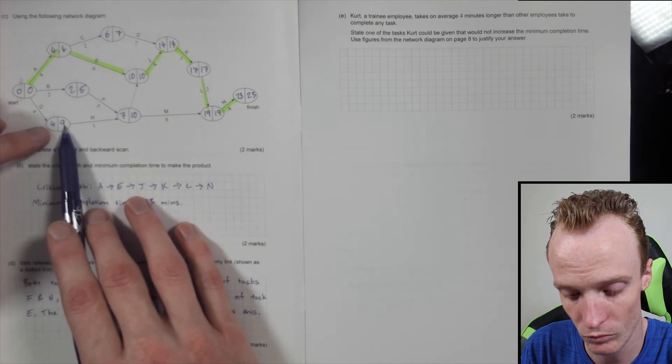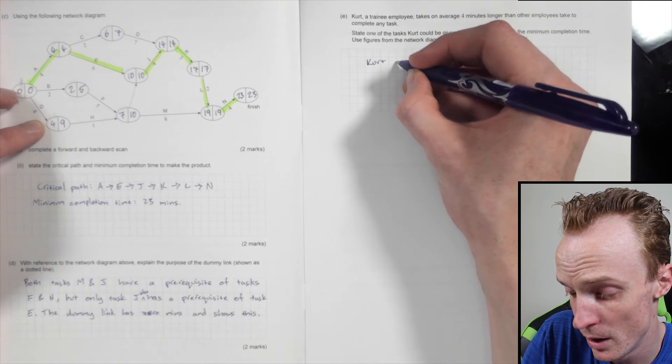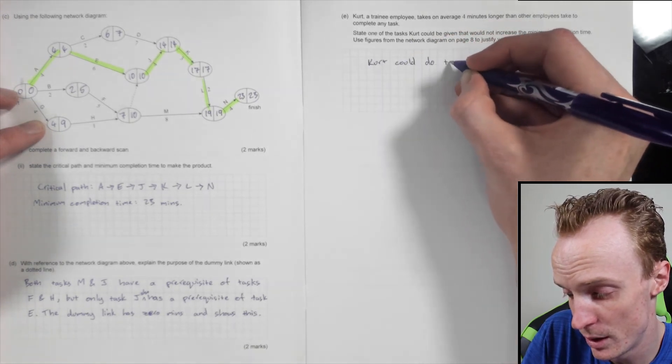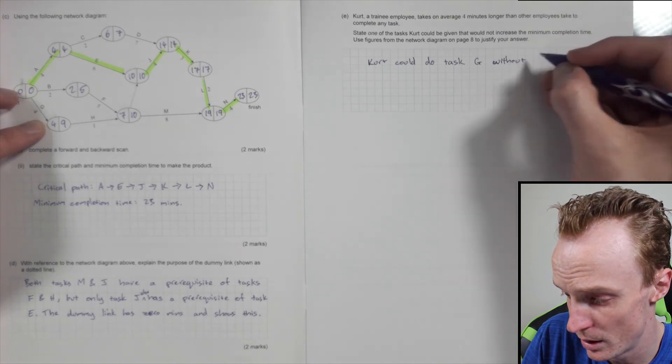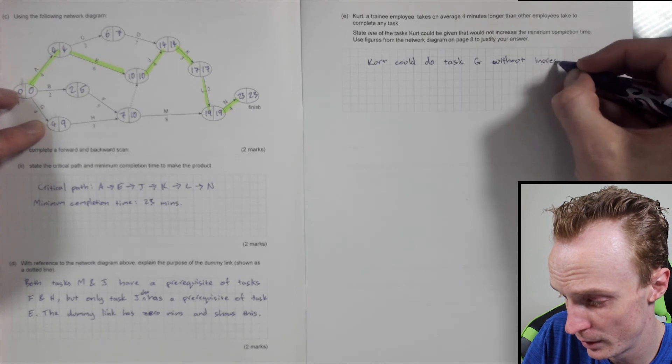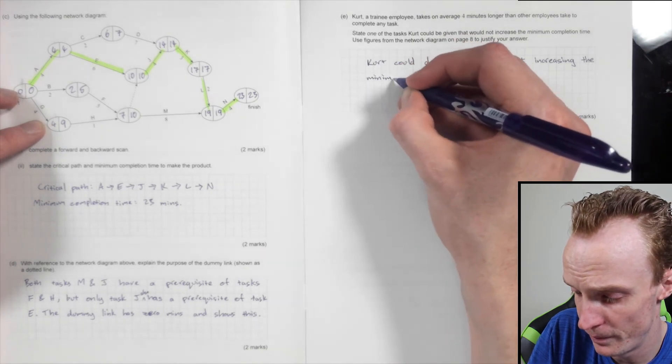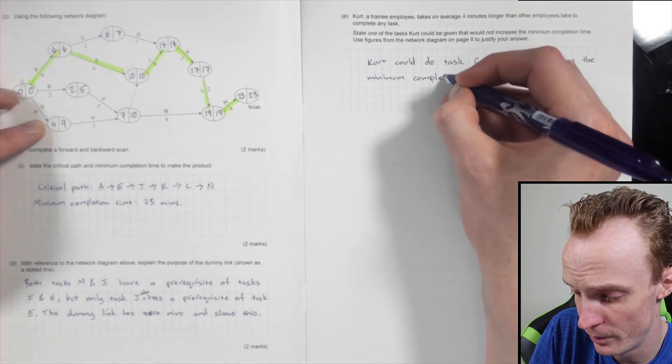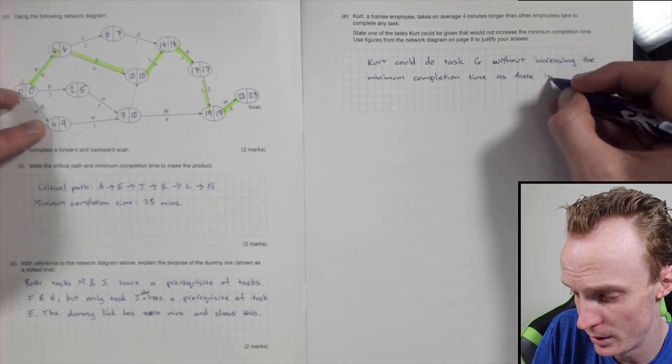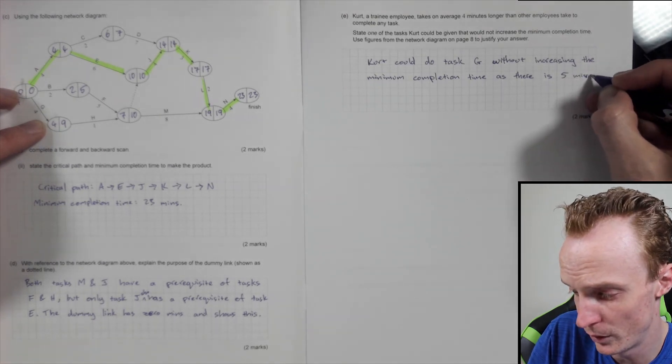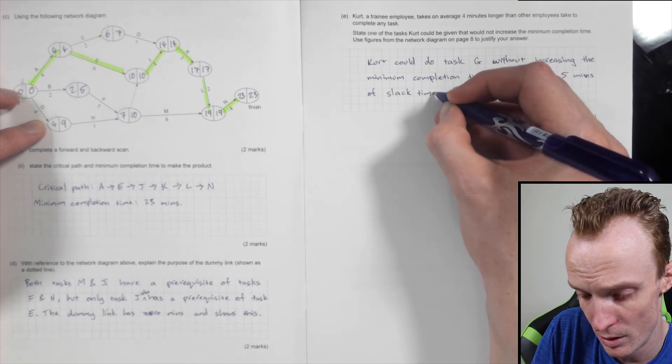So the slack time—let's give him task G. So Kurt, you only have to identify one, there is probably more than one, could do task G without increasing the minimum completion time, as there is five mins, that's mins, of slack time for this task.